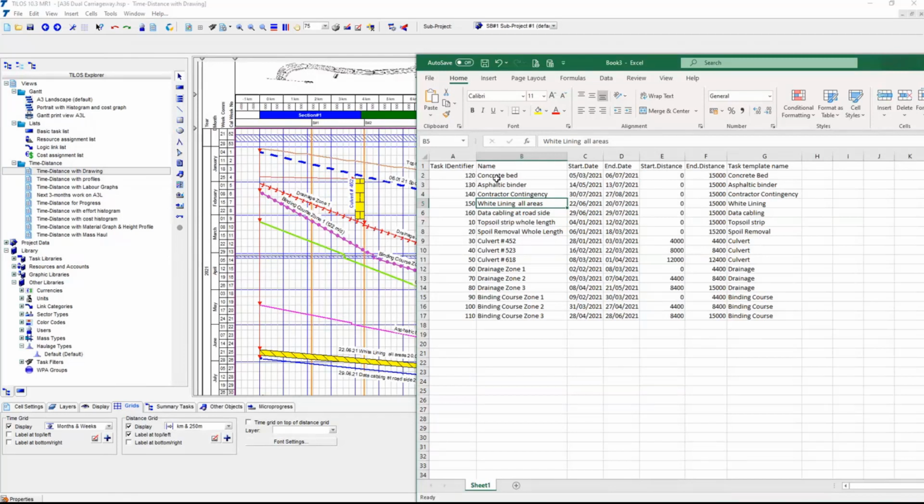So we're going to key on the ID number. So if the ID number is the same and we change something, for example, that first culvert, which was 452 here, maybe we got the distance wrong, and in fact it's at 4100 to 4500. So we can make a change to something that already exists, and because it already exists, it will make that update, or we can add something that wasn't there before. So if I had another culvert that had been introduced, I've got to change the ID number, otherwise it would be overwriting the first one.